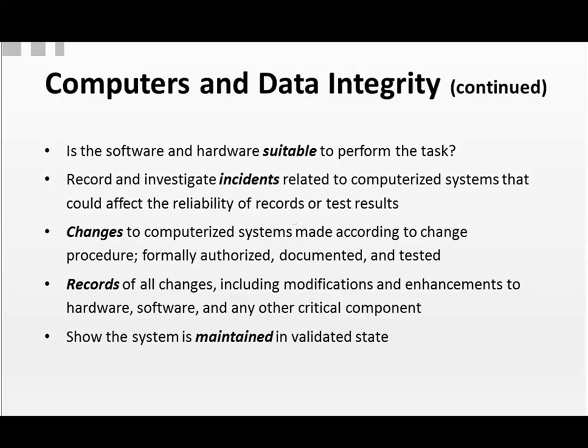There may be some additional testing if you're adding functionality, new requirements to your system. You would take your development version of the system, make your changes, put it into your test environment, and do the appropriate testing, which should include some regression testing of the original set of validation testing, and then whatever additional testing is required to show the change was made effectively and didn't alter anything else. That should all be done and approved before putting it back into the production environment in the altered state.